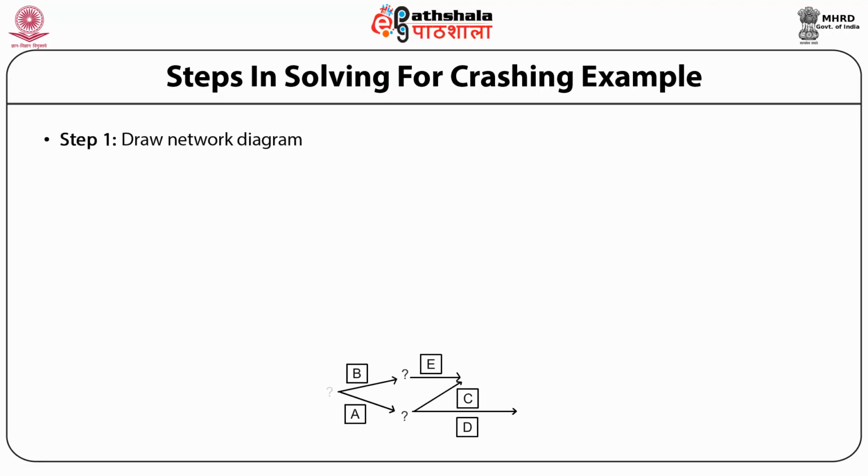Steps in solving for crashing example. Draw network diagram. Step 2. Find cost slope of each activity.